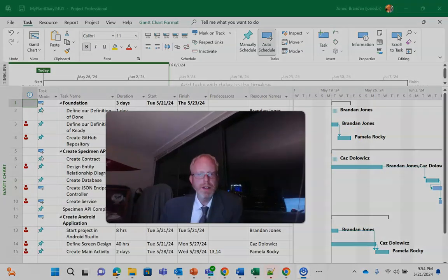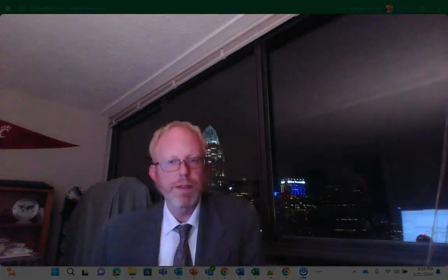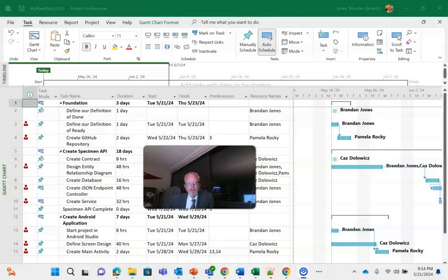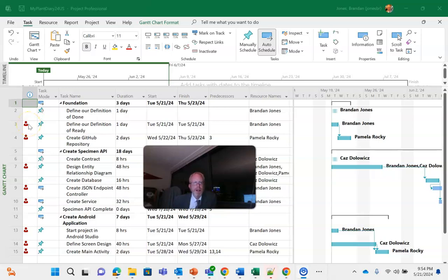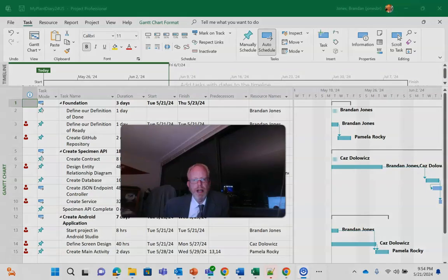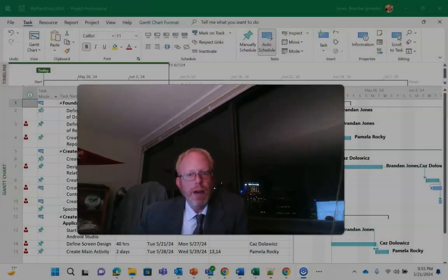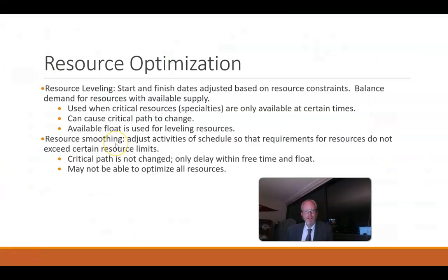Take a look over here in the left and you'll see that we have kind of a burgundy colored person, and what that indicates is that the resource is over-allocated or in other words we're asking for more than a standard work week for that person. So maybe we have a 40-hour work week defined and we currently have this person allocated to 120 hours. So in this case we can do resource leveling and this is something that I mentioned in a previous presentation.